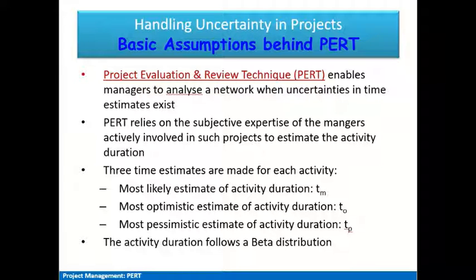Now, uncertainty mainly comes from the non-repetitive nature of the activities, because each activity associated in a project might be unique or distinct. It has not been done before, so estimating its exact time duration is a challenging task. And managers who have no prior experience of precisely this kind of activity are unable to accurately estimate time and resource requirement for completion of such activities.